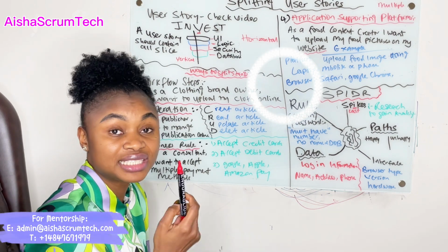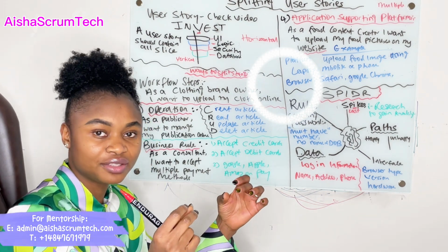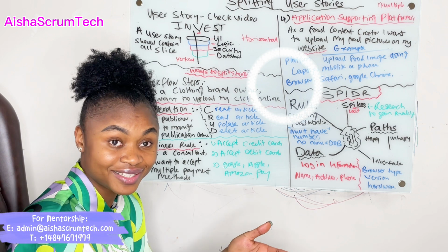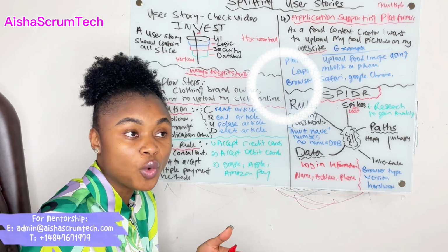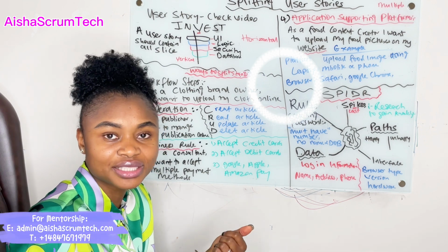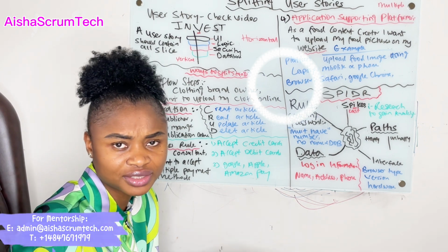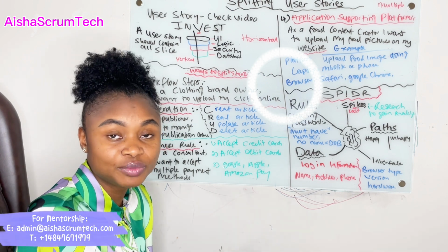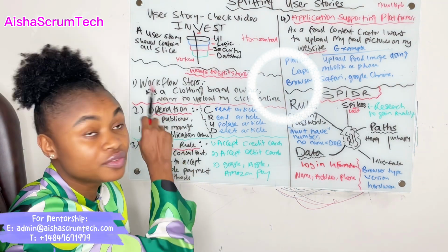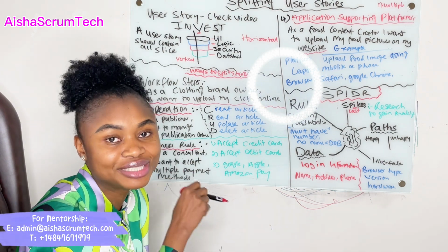So instead of writing a user story for just the database, which at the end is not going to be valuable to the end user, and you can't just use a database to get feedback from your customer, we coach our team to ensure that each of those layers is contained in the user story.